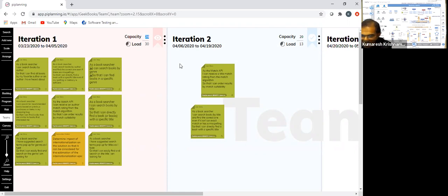Even if I say the capacity is 30, the warning sign remains, because the load cannot be equal to the capacity either. It has to be less. If I say 31, boom, it changed. Make sense? This tool is very useful in helping understand what needs to be done.